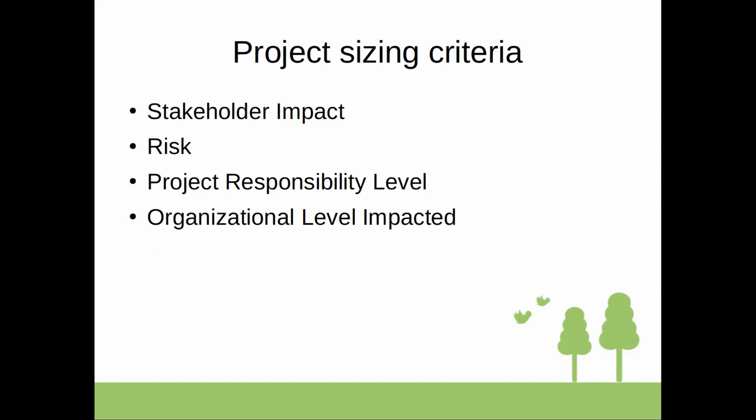So you need to identify the risks, like losing timelines, like having to change timelines for the project. That's a risk. Like there's no certainty that these dates can be met. It's a risk, and it impacts project sizing, because in that case you need to add extra to make sure that you can continue with the project even if it moves past the current date. That's as an example.